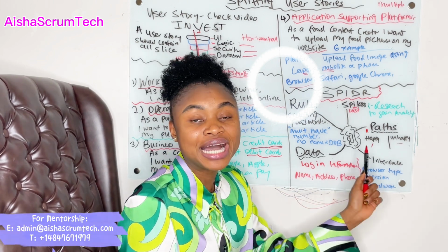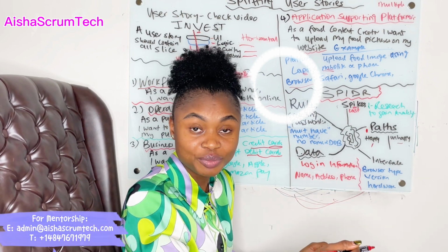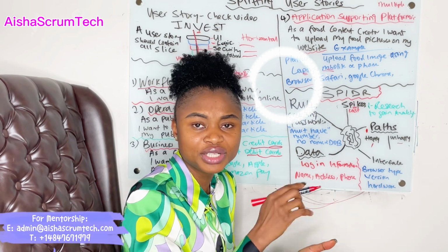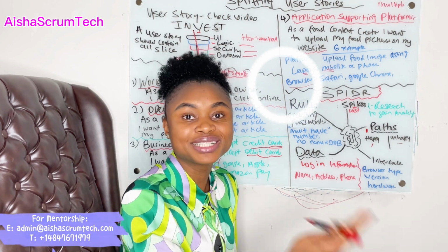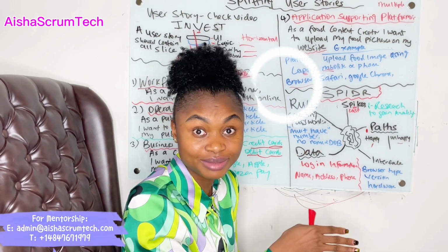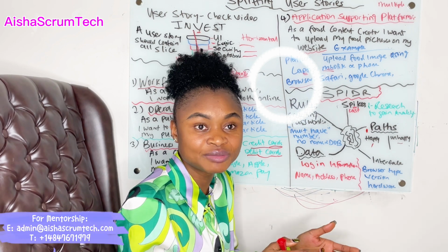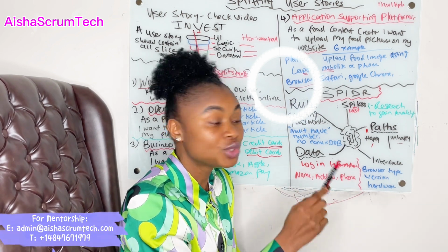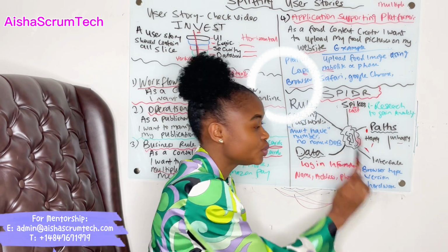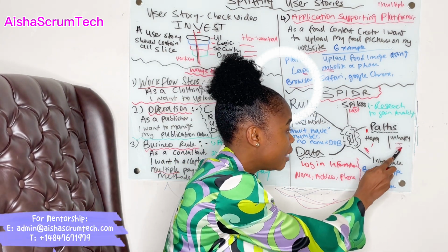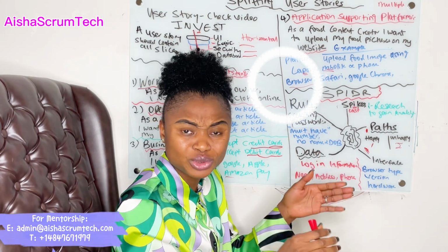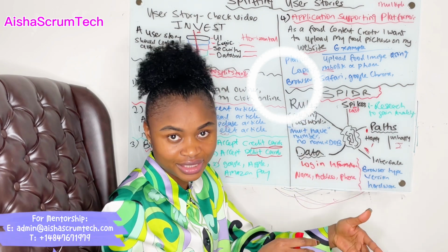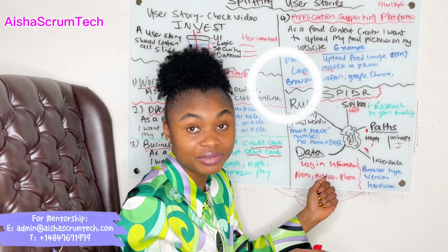Now let's focus on the unhappy path. The unhappy path would be when creating an account on Gmail, you put in your information, your login information, and at the end when you hit the create button, you are unable to create the account due to some rules in place that you were unable to meet, and you get an error message. So we can focus on the unhappy path in sprint 1 and the happy path next sprint. So there can be multiple paths. Just focus on one in a sprint and do the other path in the next sprint and the following sprint. So that's the summary for path.